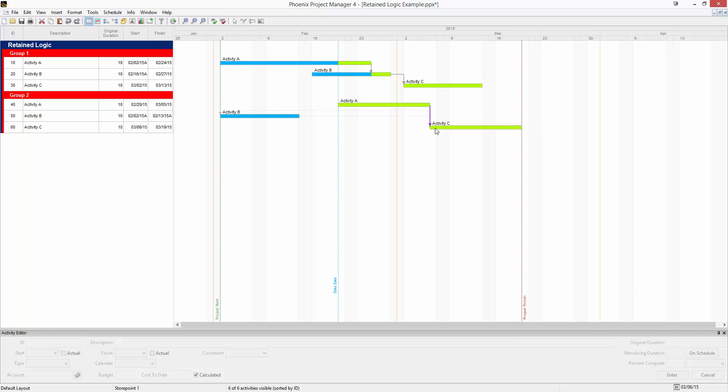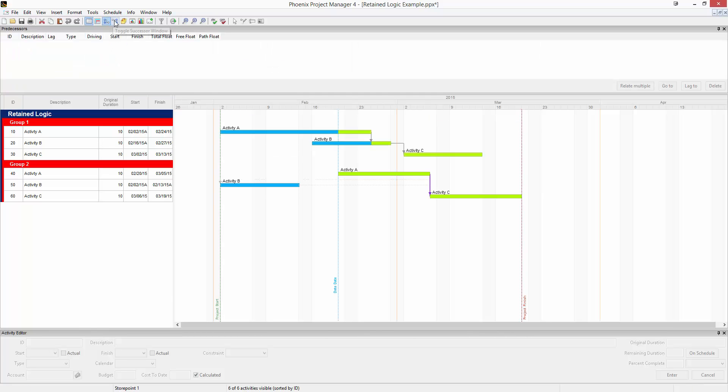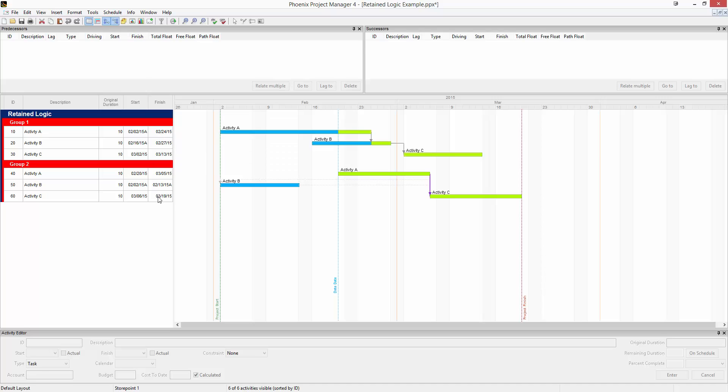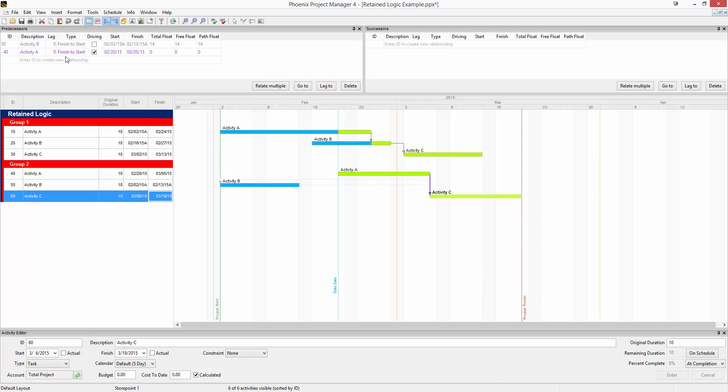Also, in the predecessor and successor windows, this retained logic relationship will also appear. You can see in here that the grayed out relationship, activity 50, was driving activity C, but now the predecessor driving activity C is activity 40, or activity A.